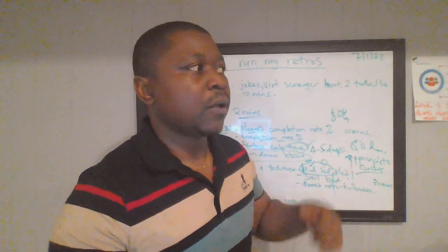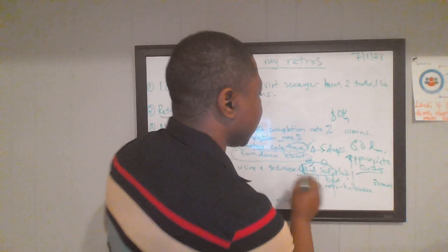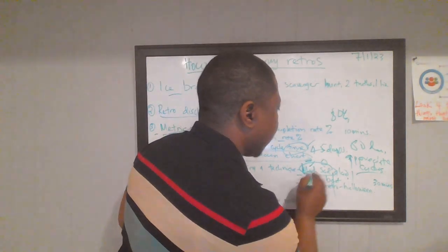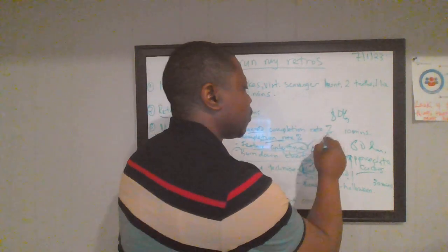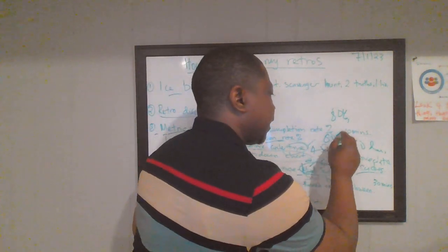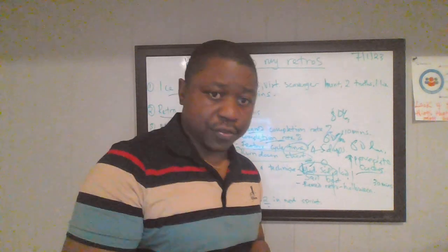An example of an improvement action item that I recall: during the sprint, one of the things that made the team sad was our completion rate, which at one time was about 60%. We did a root cause analysis and discovered that there was a lot of delay in getting our PRs, pull requests, reviewed and merged by sister teams within the ART.